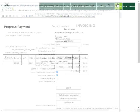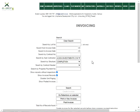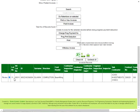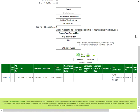You can also delete an invoice. You can withdraw an invoice if you check it and you withdraw it, you can do so unless it's been posted. If it's been posted you can't change it anymore and that's to prevent fraud.